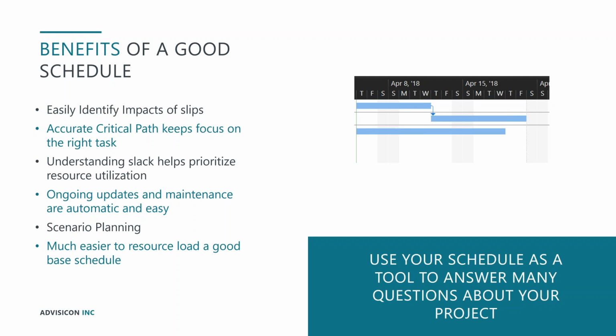And that's really nice, especially when we get into Project Server, Project Online. It becomes very important because as we're looking at resource planning across the whole portfolio of projects, we need to be able to pick up projects that we haven't started yet and move them to different spots in the timeline and determine how that impacts our resources. So we can see where we have resource overlaps and things like that. So when we're doing our portfolio analysis and our portfolio planning, it's really important to have good schedules, so that way we can just pick them up and move them, and everything else will automatically calculate properly.